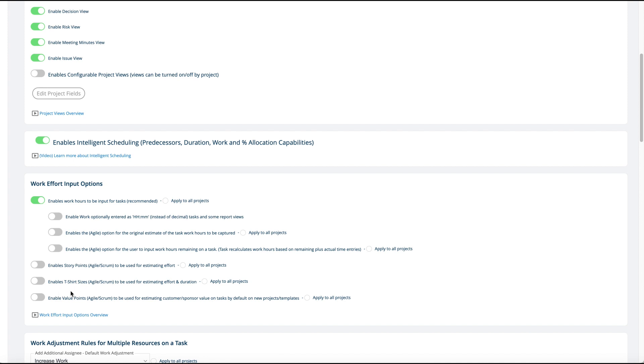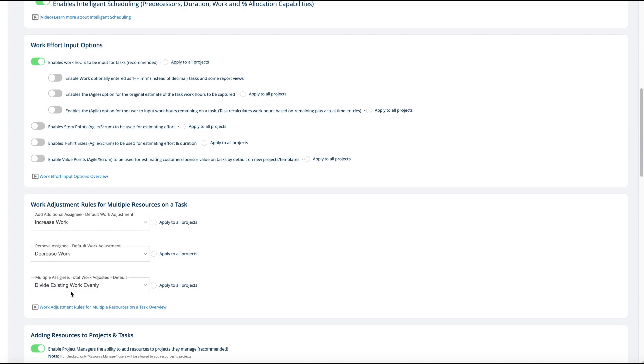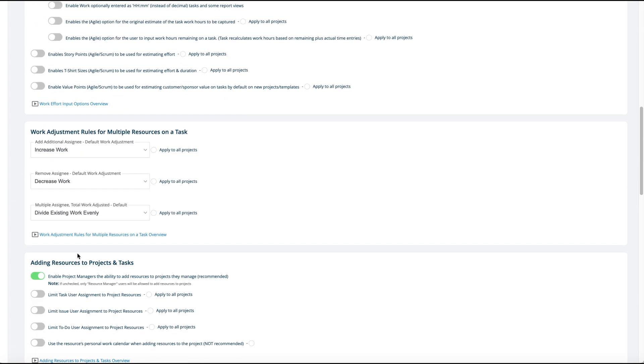I'm not going to get into details of what those things are. Normally everyone just enters in their work hours, that's pretty straightforward. Here's work adjustment hours for multiple resources. So normally when you have a task that you set up and say this task is eight hours and you put someone on it, if you add another person it would give the second person eight more hours.